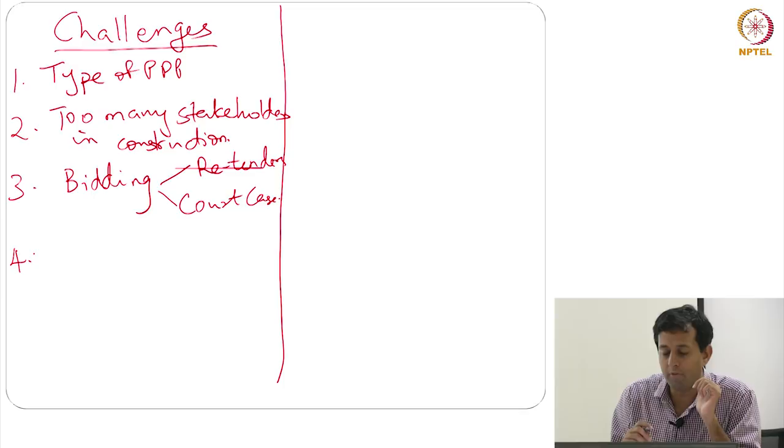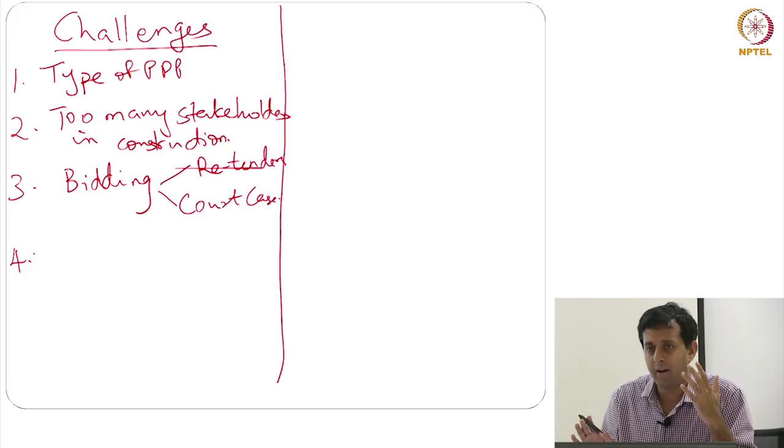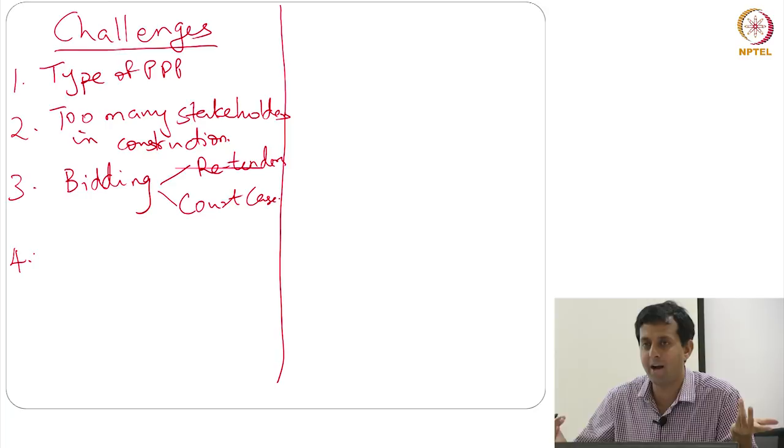The 5 rupees would not have affected the project cost. 5 rupees is a revenue share. I have to pay you 5% more revenue share than I expected. If I don't make any revenue, it doesn't matter whether I promised you 40% or 60% or 90%. It's just a revenue share, so it doesn't affect the costs of construction.